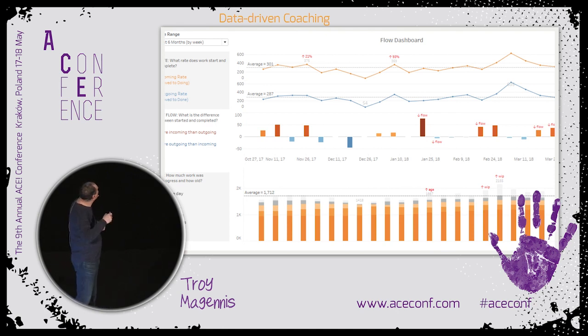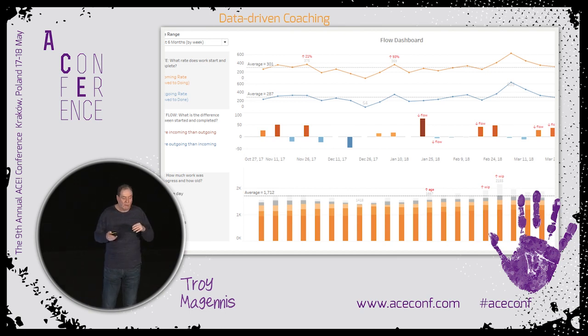You'll notice that I don't use reference lines, because reference lines exceeding or going under it normally isn't the easiest or the correct measure for people to know that they're off track. It just means that one data point's off track. So a lot of these measures are summaries of over the previous 4 weeks or 5 weeks. In other words, this is a longer term trend that I want to draw your eye to. And with a control chart, the correct way to use a control chart is 3 or 4 samples beyond a control line. But if you put this up in a projector in a room, people will spot just the ones which are exceeding the control limits and react too soon. So it's all about stopping them reacting too soon.